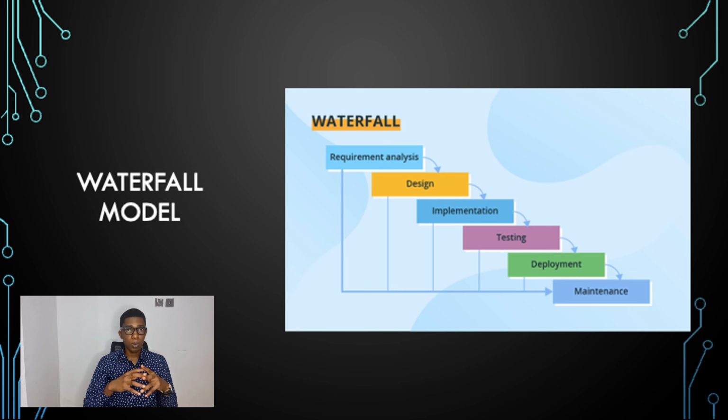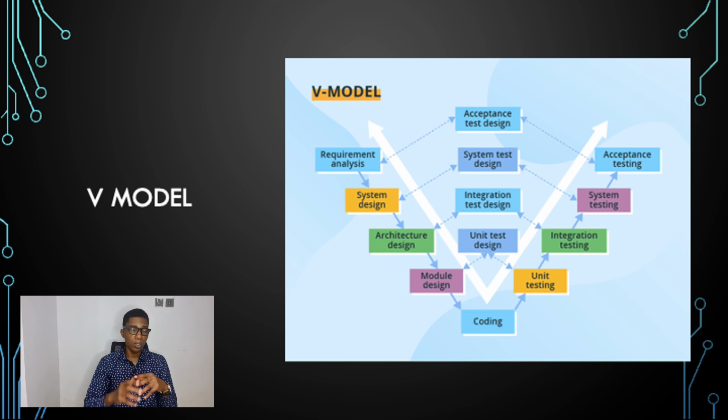The next one we'll be looking at is the V model, the verification and validation model. It's a linear model with each stage having a corresponding testing activity. Such workflow organization implies exceptional quality control, but at the same time, it makes the V model one of the most expensive and time-consuming models. Even though mistakes in requirement specification, code and architecture errors can be detected early, changes during the development are still quite expensive and difficult to implement.